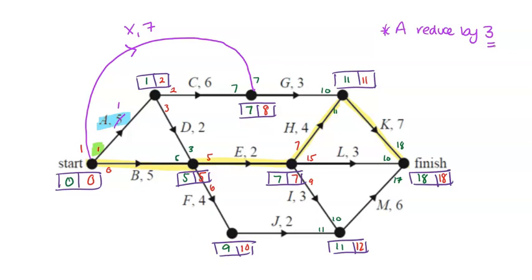Instead of down to 1, it goes only down to 2, and we check that flow through, that we're not causing any change to what the critical path would be.